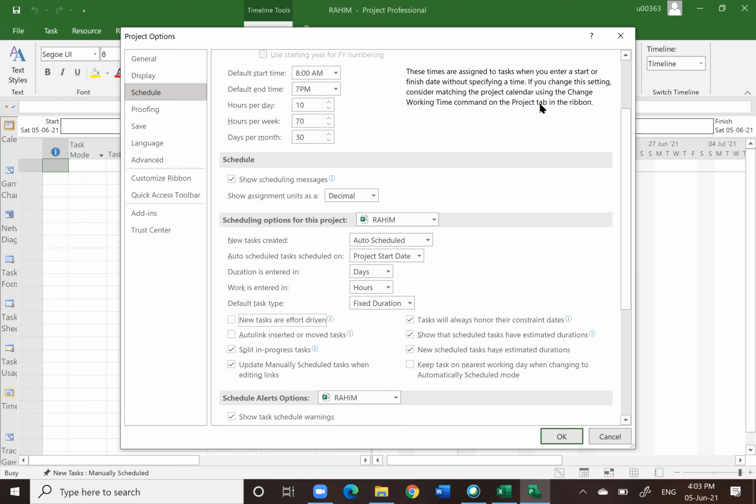So in our piling example, we initially calculated 10 days equivalent to 2 piling rigs. But if I only want to put one piling rig, automatically the time will be adjusted to 20 days. As simple as that. The computer will do that.